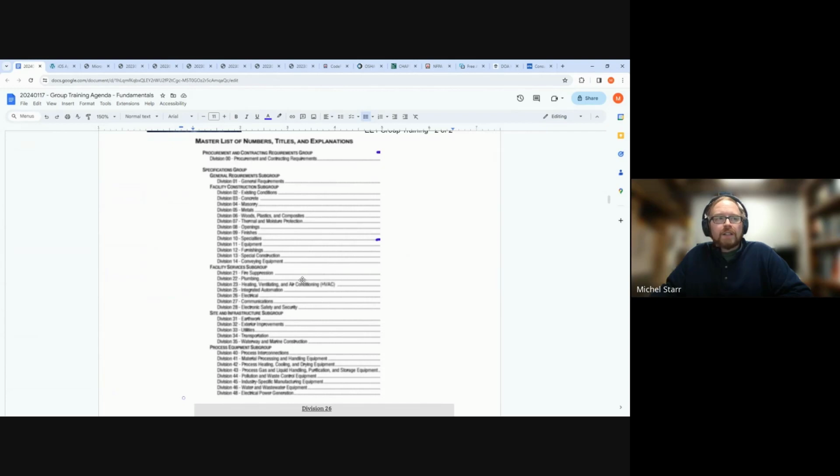So the electrical contractor isn't by default, or as everybody says, obviously, look, it says it, responsible for the division 26. That's probably correct, but the procurement that's provided by, for instance, a construction manager or a general contractor describes in a section, usually in their appendices, a scope of work.